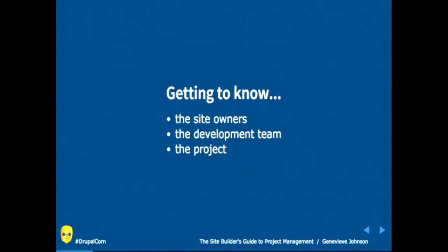And then knowing the project. What is it that the site owners want you to build for them? What are their functional requirements? Who's going to use the end product? And not just what the goals are of the site owners, but how they're going to measure them. So when someone just says vaguely, well, we want to redesign our website because we want to get more traffic on the site, that could mean different things to different people. More traffic could mean they want to increase the number of people coming to the site. It could also mean they just want people to go through more of the content on their site and spend more time there. So really fleshing out what they mean.